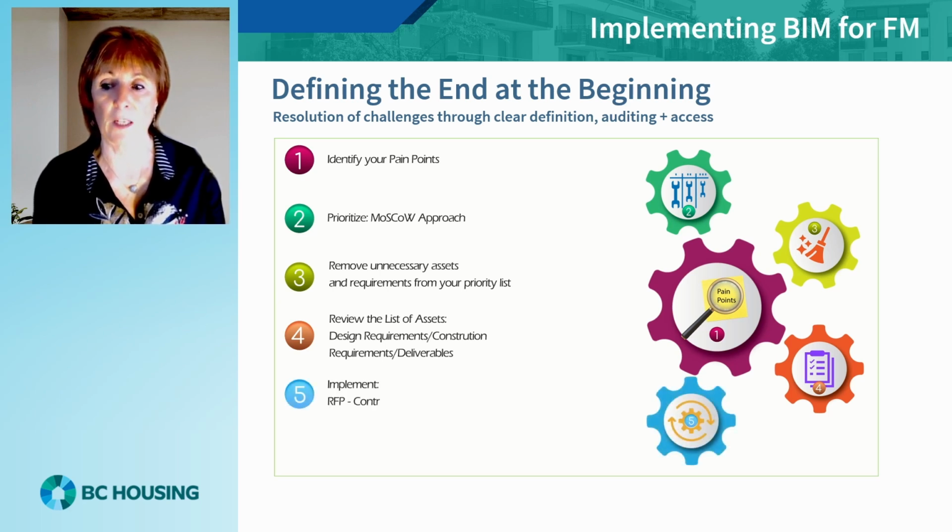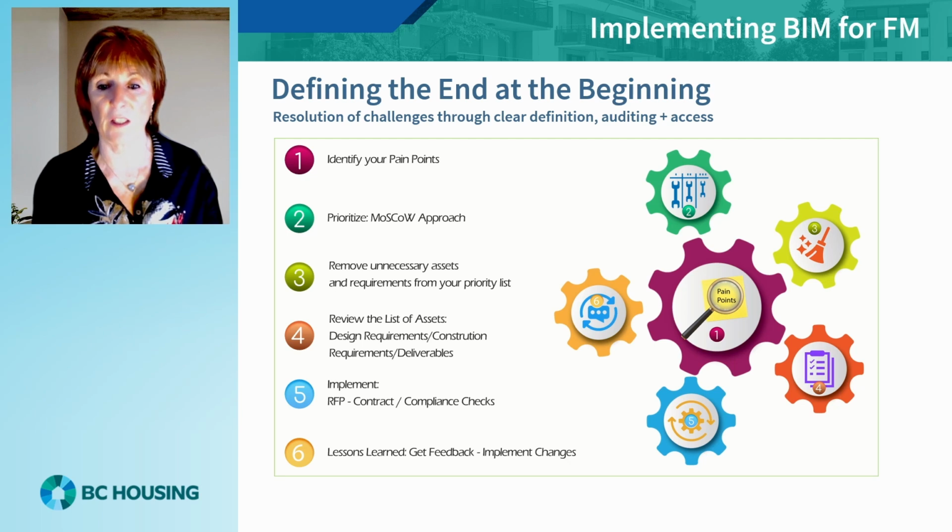Review what impact what you have asked for will have on the work effort for the design and construction teams. Ensure that your requirements are included in the RFP for the project. Asking for this information after award of contract typically significantly increases the cost. Make sure you include a lessons learned feedback loop in your process so that you continually refine and improve the process.